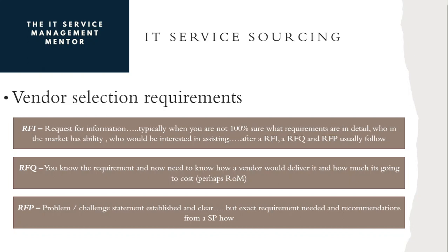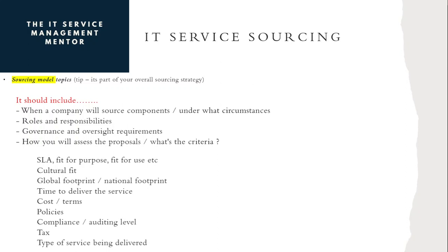And then an RFP, you've established what is needed, the problem statement, the challenge statement. It's there, it's out there. However, there are still some additional requirements needed, and you want to understand how a particular service provider would deliver that, how they would go about it, and that's the RFP.